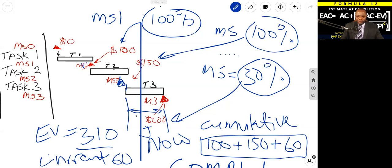This is number three in our earned value methods series. And using the earned value method known as milestone weighting with percent complete has advantages and, of course, disadvantages. But one of the advantages is it requires objective measurable milestones. So you don't just throw out any old milestone. You've got to think, are we really done with something tangible, something sensible? So that is one of the advantages of it.